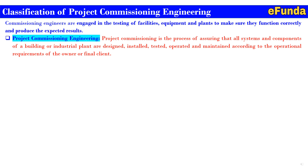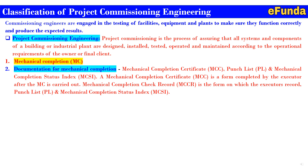The first classification is mechanical completion (MC). Mechanical completion of the project is achieved when the work has been completed mechanically and structurally in good condition, and when the activities specified in the checklist have been carried out. The documentation for mechanical completion includes: the mechanical completion certificate (MCC), punch list (PL), and mechanical completion status index (MCSI). The mechanical completion package consists of the completion certificate and relevant attachments for the various activities to be carried out.